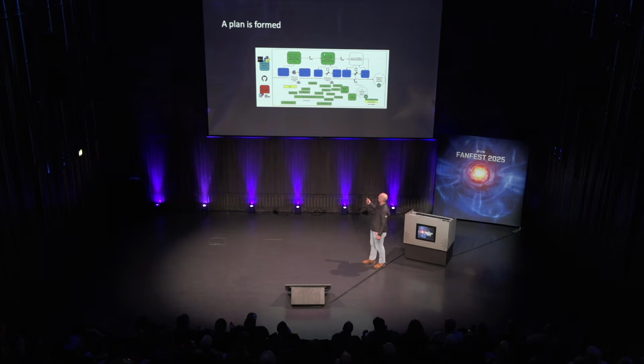There's a second split that kind of goes through here, because we first wanted to make sure that the Python code base still runs with Python 2 as well. The Python ecosystem gives us an option to have source code compatibility between 2 and 3 to a large degree. And this is what we first did. So we get some experience there, see if we break some fundamental game features by just going from 2 to 3 in the Python code world. And then later on, we decided, okay, let's go all in on Python 3 only.